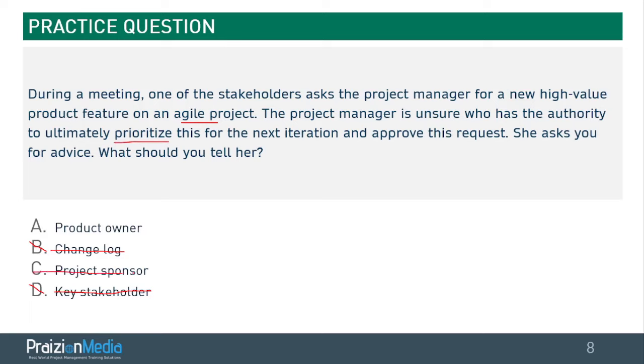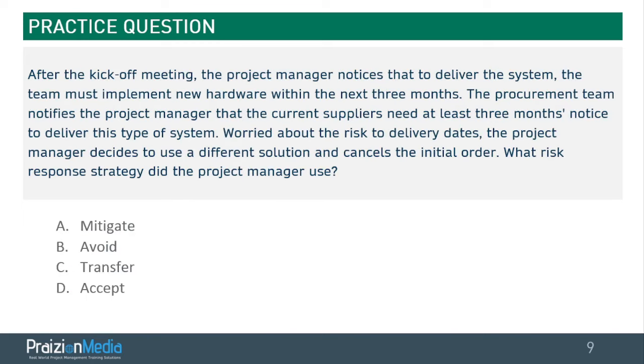It's not the job of the project sponsor, it's the job of the product owner to prioritize, right? The priority of the backlog is something the product owner should be all over. Could the team help? They could, but the product owner should have the final say as far as the value of the items. User stories have value. We could prioritize by value, prioritize by risk and other factors. So the best answer is A. All right, let's move on.